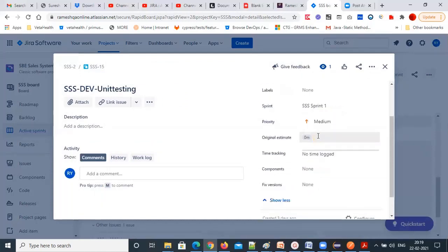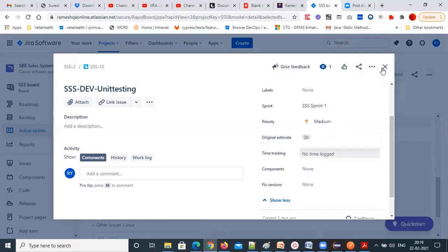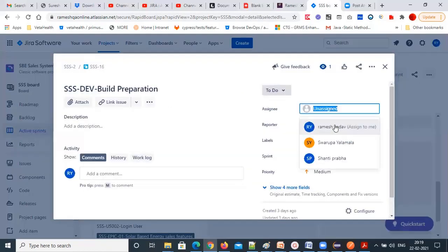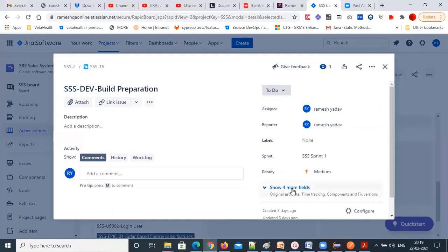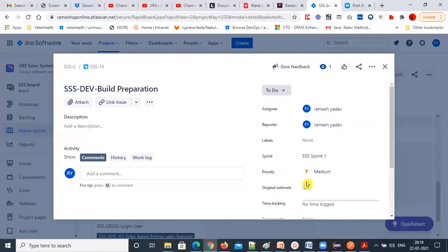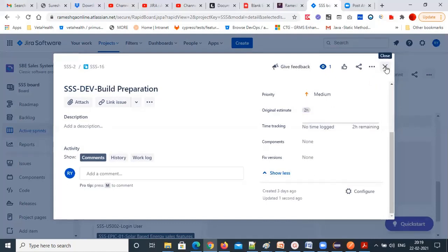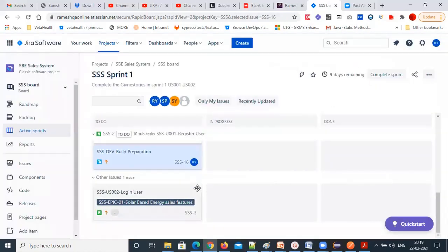This sprint estimation will be done the same way. Two hours I'm giving for unit testing. Build preparation is also done by developers only, not by us — you can give two hours for build preparation. That's the task we create.